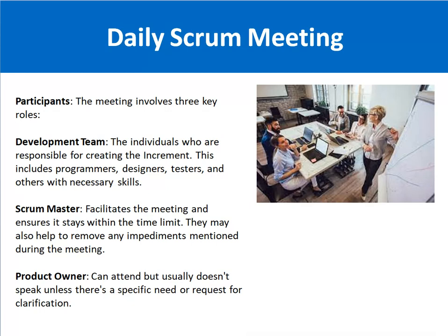Next is the Scrum Master. The Scrum Master facilitates the meeting and ensures that the time limit is followed, and if there are any impediments, issues and roadblocks, they can notice them and write them down so they can be addressed properly.